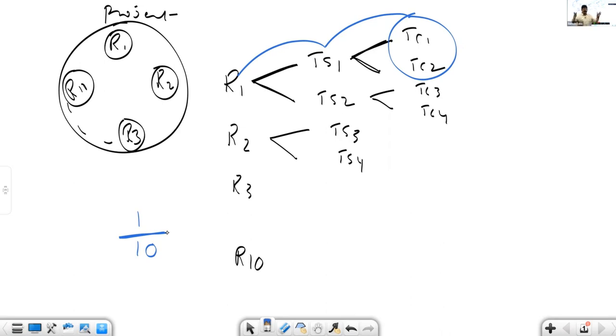So I don't ask all of my team members what work they did. Once you prepare the scenarios and create the test cases, you need to immediately update the RTM document. You have to map your test cases to the appropriate scenario and appropriate requirement. So as a manager, I consider whatever status is available in the RTM as the current status of the project. Today evening, this is the status. Totally 10 requirements to be covered. As per the RTM status, out of 10, only for 1 requirement are test cases completed.